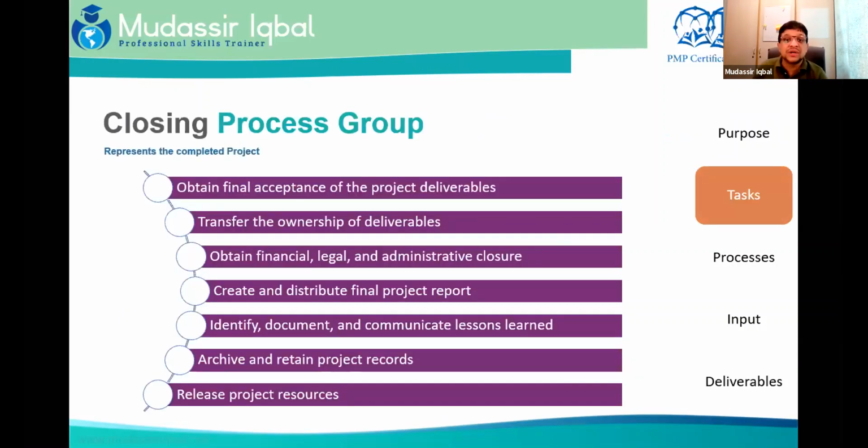A carefully structured project closure phase should ensure that the project is brought to a controlled end, which effectively means all the project deliverables are formally transferred to others. All the lessons learned of projects are properly documented and archived so that these can be available later. Any contract that was established by the project is formally closed. There is nothing outstanding. You are looking at obtaining the acceptance of the customer and the sponsor, releasing the people and the resources, reporting on team performance and lessons learned, updating or finalizing the documents, project records, and the results, finalizing your procurements, performing quality assurance activities, storing and archiving the information so that this can be extracted later on